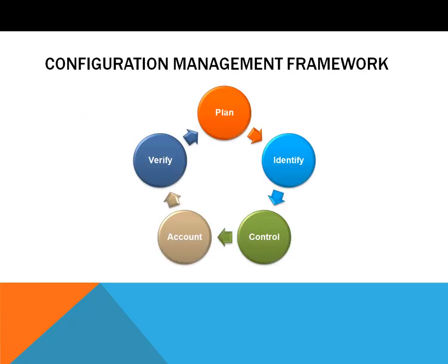Configuration management really moves through 5 processes: you plan, you identify, you control, you account for the requirements, and then you verify, and then it starts over. So this is the configuration management framework.